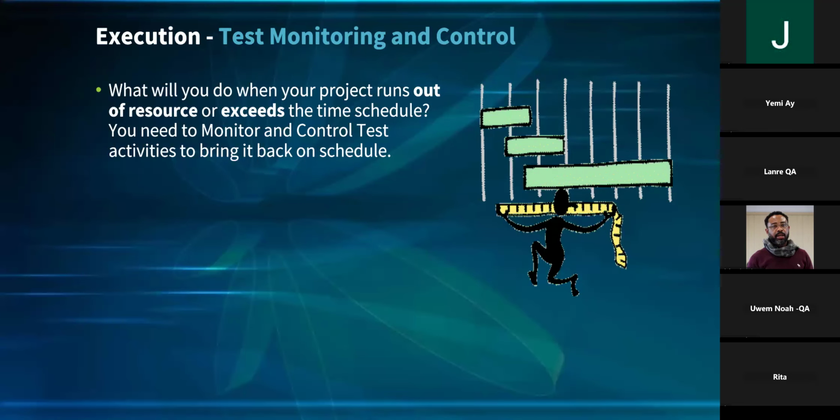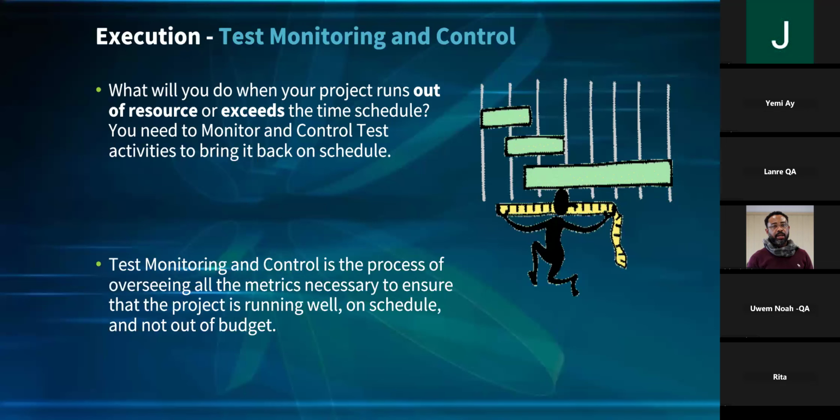Now that gives me a mindset that one day is already short of the test plan I'm expecting for 2 weeks, my test execution for 2 weeks. So with that phase and analysis, it will make me understand that let me quickly draft someone in to help me to test. Those are the key things that you have there.